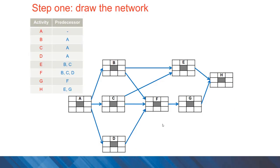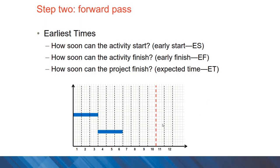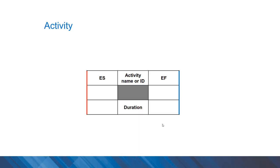There are different steps in network scheduling. The first one is to draw the network based on the logic given, and we have examples here. The second step is to calculate the forward pass and having earliest times. In the activity block, these values are populated on the top row of the block.